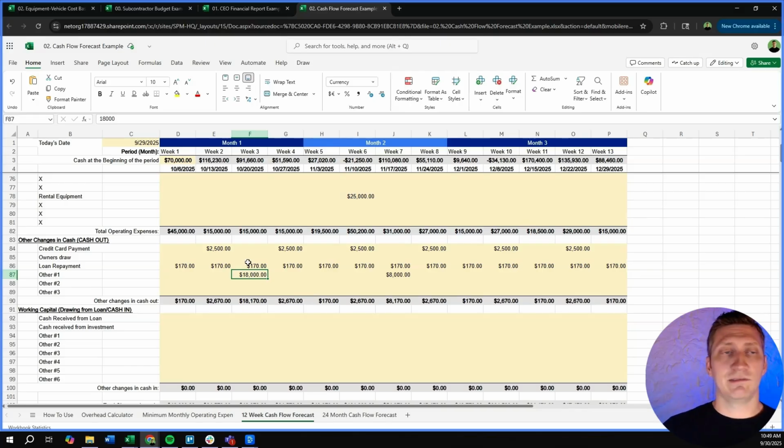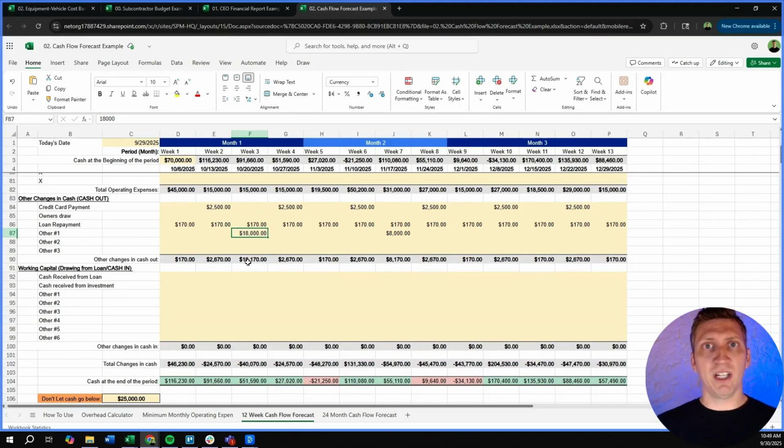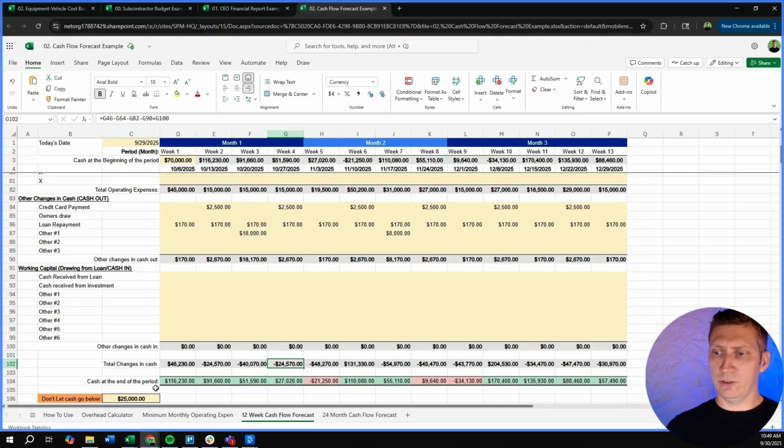And that's basically your cash flow, is money in minus money out. And that gives you a delta. So that delta is, did I bring more money in than I spent, or spent more money than I brought in this month? And that's represented here. You can see we made positive 46, we lost 24, we lost 40, we lost 24. So what happens when we lose money so many months consecutively in a row and we become negative?